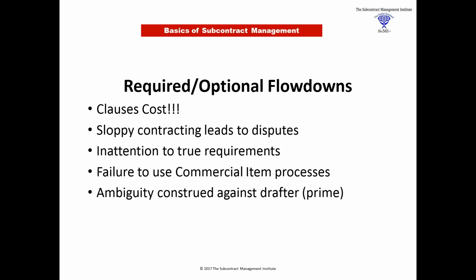But the most important part of that says, once a good or service has been declared a commercial item, then the government shall, mandatory, use the commercial item processes. That's FAR Part 12. Too many contracting officers think they have a lot of latitude there. And if you look at the commercial item processes carefully, when FASA first set it all up, it was designed to have 4 clauses that would have to be flowed to subcontractors under commercial items. Just 4. Part of the idea was to bring people who wouldn't normally do business with the government into the government, because one of their big complaints was, I've got too many clauses to comply with. Okay, we get that. So the government said 4. We're just going to limit it to 4.